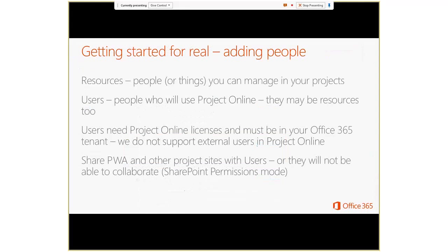Yeah, thanks, Ake. So I talked about some of this as I was going through the video. So getting started for real, adding people. Just a few terms that, if you're not familiar with using Project or Project Server, may be confusing. Resources and users, what's the difference? Resources are the people or things that you can manage in your project. So you'll assign a resource to do a task. And then users are the people who will use Project Online.